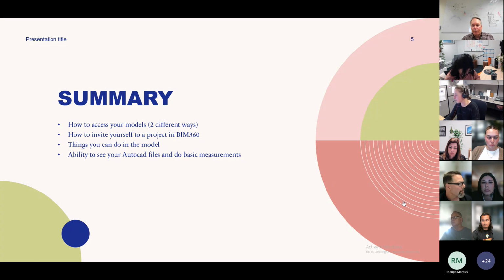But when I talked to James about it, we're now going to publish weekly. Usually by the time you get to the takeoff group, we've published the most recent model because we need it for the balance schedule and everything else. But there were times before when the shop drawings weren't getting published very often. So our goal is to publish every week on all the jobs that we're working on. Okay, cool.